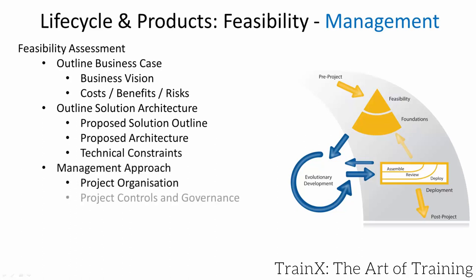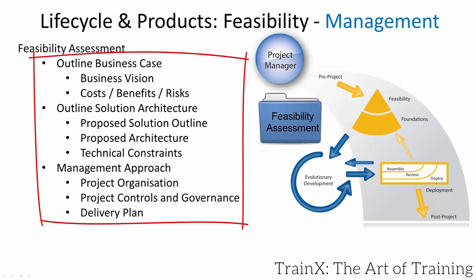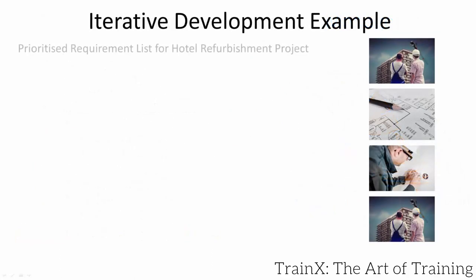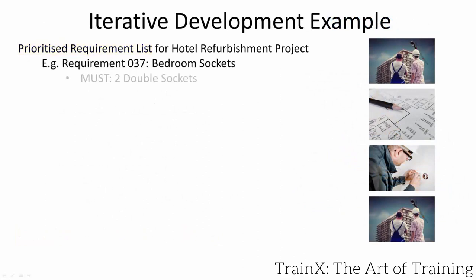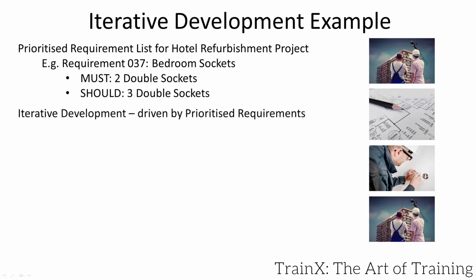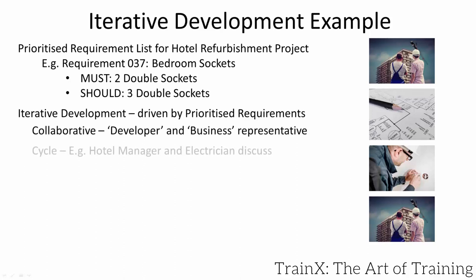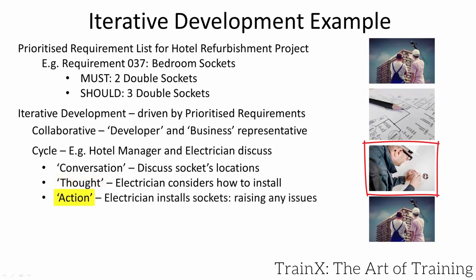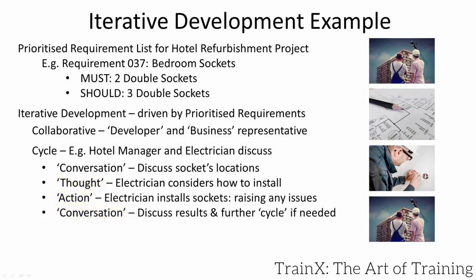The project governance — in our example the CEO — then decides whether to progress to foundations. For a hotel refurbishment example, the PRL states each bedroom must have two and should have three double sockets. If these were on the architect's initial drawing, this could be big design up front. Using Agile PM's enough design up front approach, the hotel manager and electrician agree the positions of the sockets using their experience. The iterative cycle consists of conversation, thought, action, then conversation. If adjustments are needed, a further cycle ensues. The Agile PM role for the hotel manager is business ambassador and for the electrician is solution developer.